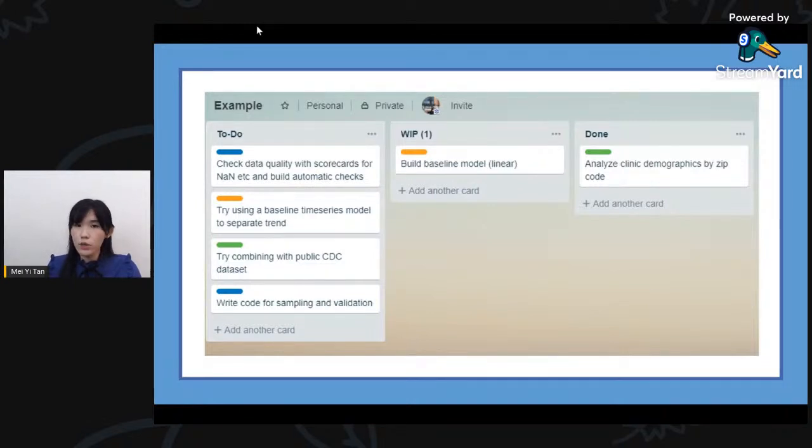So if you have just one source, maybe straight from a system or a database, it is already structured and the data quality is very good, and we don't need to spend much time on the data cleaning and transformations. In that case, we can allocate around 1 to 2 weeks to focus on the data cleaning.